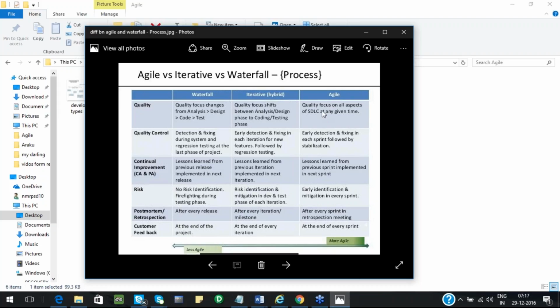So to break it up, all the teams are involved in the agile methodology. We are not saying that in the waterfall model all the teams are not involved, but the collaboration is not that great in waterfall. Development and testing, or even the environment build, will not be done in parallel. Only upon one team completing, the other team will start. So the quality lies only after testing is done.